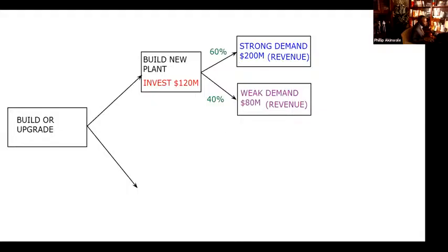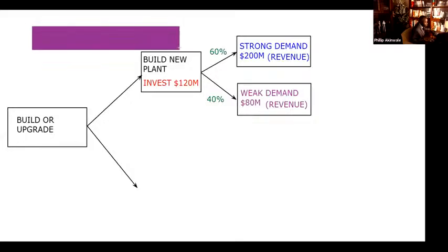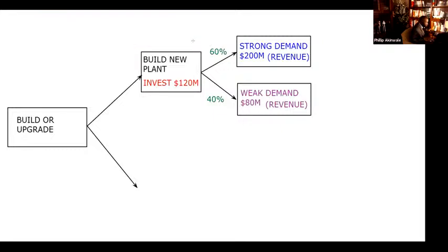So we're going to take a look at the strong demand. We're going to find the profit, and then multiply that amount by the percentage, but we're going to convert this percent into a decimal. And then we're going to have an outcome. We're going to put the outcome here, let's do that in blue, so you guys can keep track of what is happening.